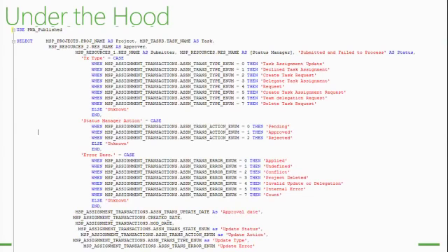And it can be pending. That means it has been submitted, but the approver has not done anything with it. So it's pending in the system, and it's basically stuck there until someone, the approver or the task update, does something. It could be approved. So the approver, we know, has approved it. And it should have flowed into the project, right? As long as the approver or the project manager opens the project and accepts and receives all the updates, right? If the project manager is on vacation, it's not going to happen if there is no delegation.